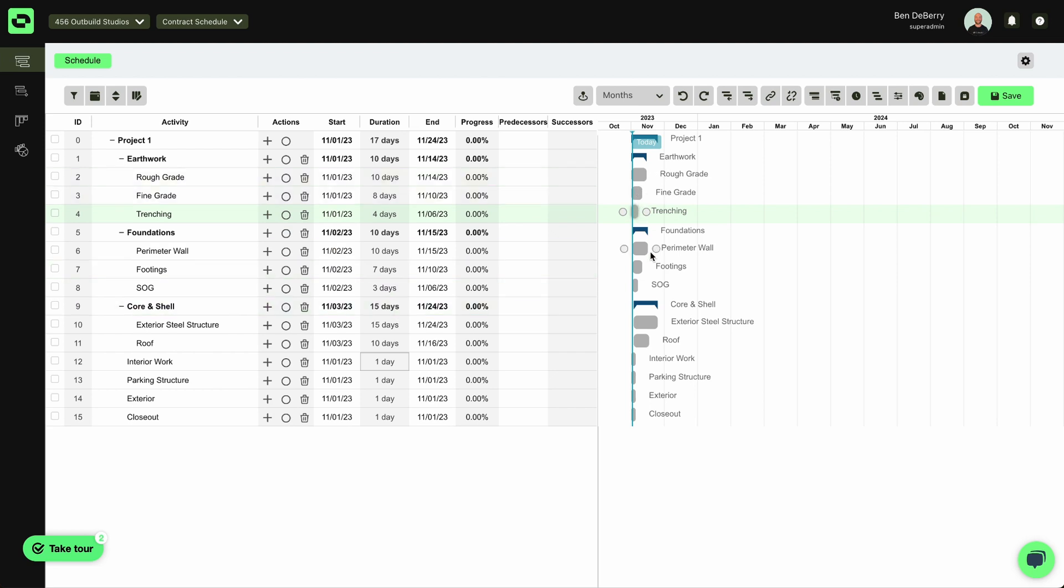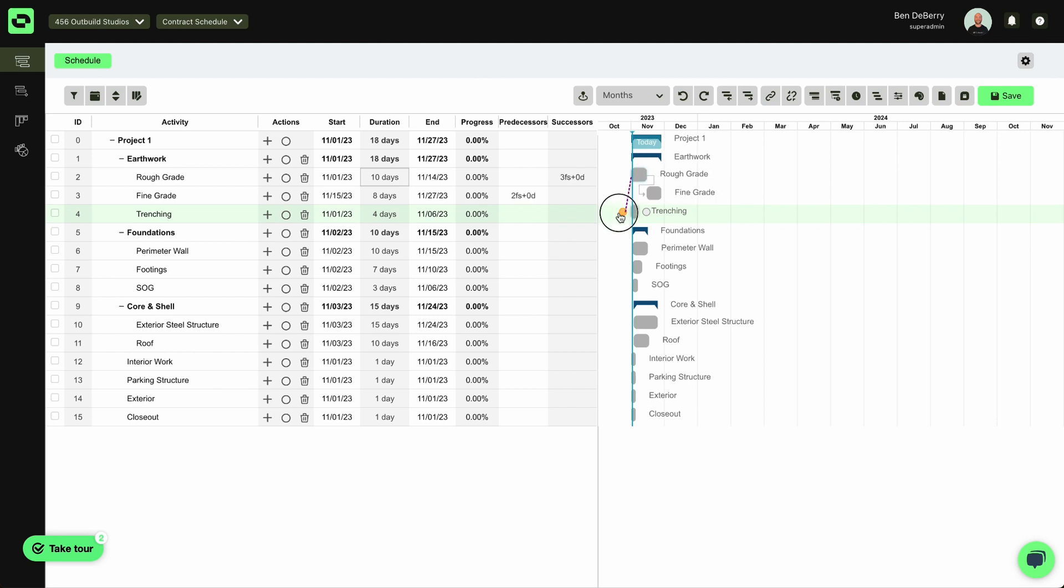now I can start thinking about my sequence of activities. So maybe I've got Rough Grade. I can go Finish to Start to Fine Grade. And I can even start Rough Grade and Trenching at the same time.